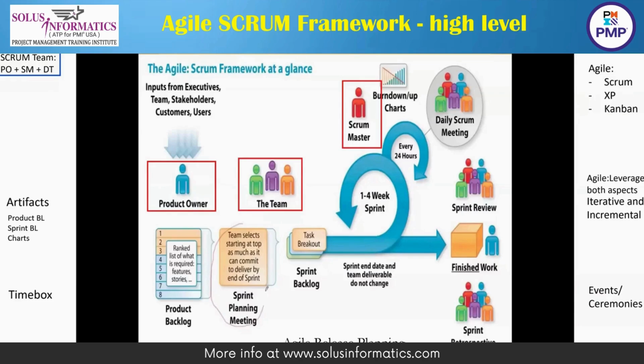In Agile Scrum, the team size will be 5 plus or minus 2. The maximum team size will be 7, and the minimum team size will be 3. That 7 should include everyone, the developer, the tester, the QA, QC guy. And then you have the product owner. He's more like a business analyst, an interface between the customer and the in-house team.